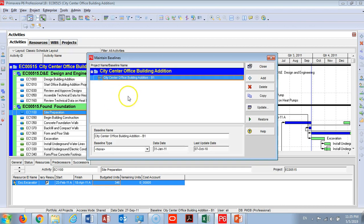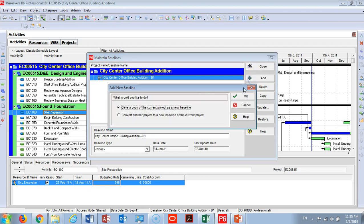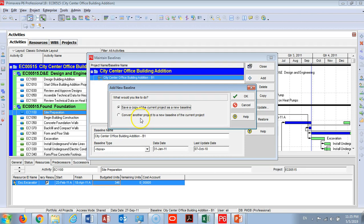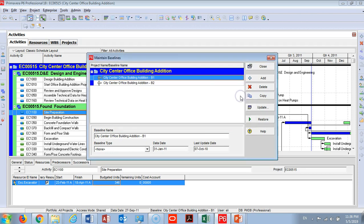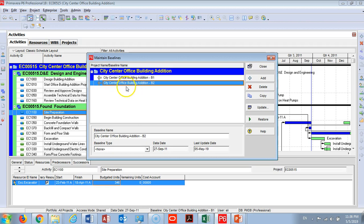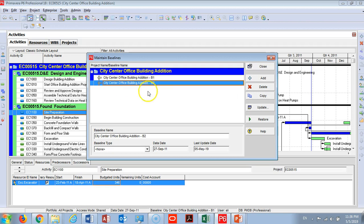What I will do here is click Add. You can find here what you would like to do: save a copy of the current project as a new baseline, or if you have a different project you would like to assign it as a baseline. I will choose save a copy of the current project as a baseline. I will click OK and you will see right now that the program created Center City Office Building Addition P2 as a baseline with the name here.